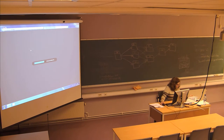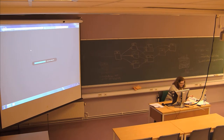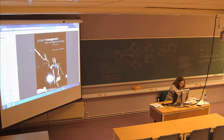The definition of free slack is: it is the amount of time an activity can be delayed without delaying an immediately following successor activity. Free slack is the amount of time an activity can exceed its early finish date without affecting the early start date of the successor.